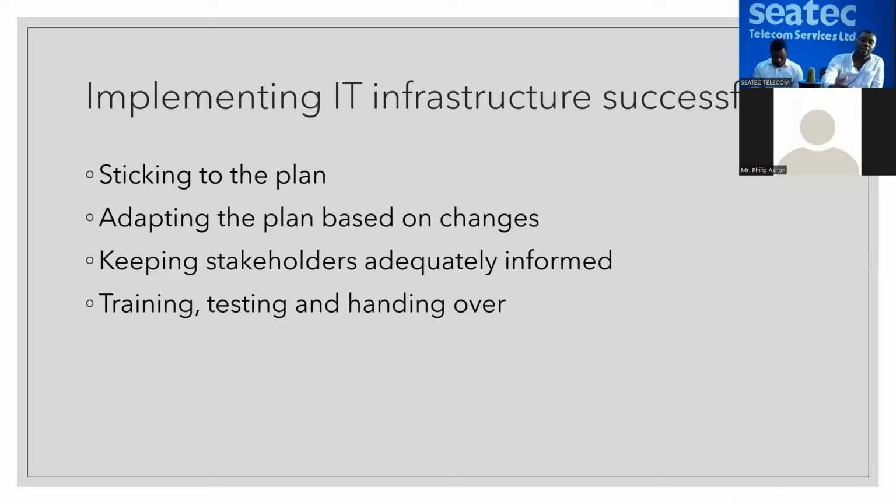It's important to test, to fine tune. Yes, you followed your plan, you deploy, but you need to test it. There are call center solutions and other things that it's not going live. So you can't know if 6,000 calls are going to be queued properly by just testing with 2 calls. So it's important to run it live and then fine tune your solution after you deploy.